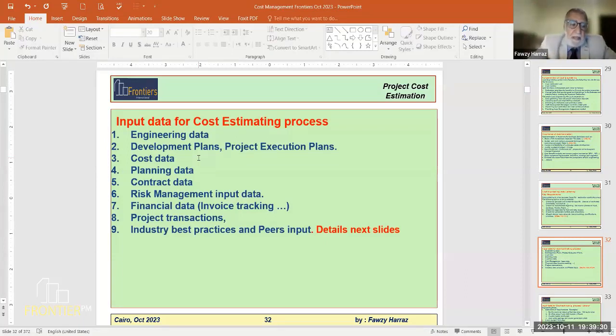To clarify this, if, for example, we are a contractor and the estimator said the total cost of the project is, say, 1 billion, including the contingency. So the company will add a markup, say 30%, and will bid a price for $1,300,000,000.